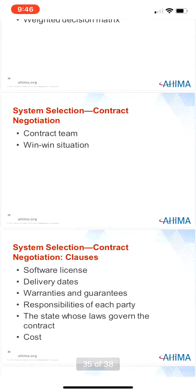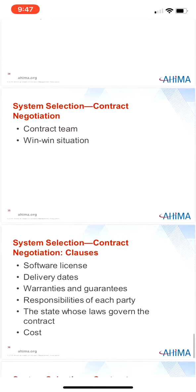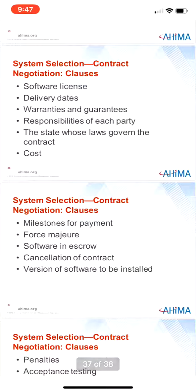Step four is contract negotiation. Once the decision of which information system to purchase has been made, the contract negotiation process begins. Some healthcare facilities start negotiations with more than one vendor, then choose one vendor to continue with. Typically a contract team — not the project team — negotiates the contract; the negotiating team should include at least the CIO and an attorney. Contract clauses will cover: software licenses, delivery dates, warranties and guarantees, the responsibilities of each party, the state whose law governs the contract, the cost, milestones for payment, force majeure, software in escrow, cancellation of contract, version of software to be installed, penalties, acceptance testing, maintenance updates, and training and documentation.